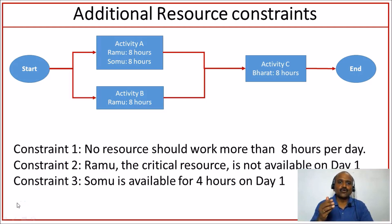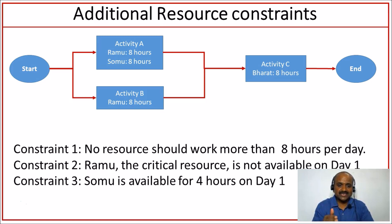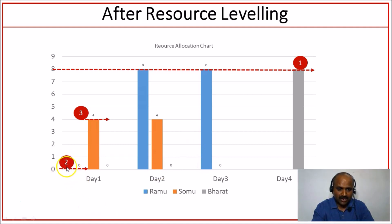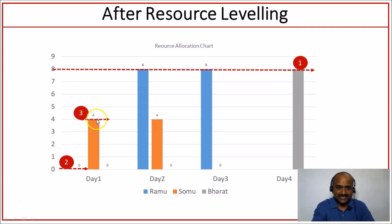What will happen if we have more resource constraints applied to our example? We already know constraint one states that no resource should work more than eight hours. Constraint 2 says Ramu, the critical resource, is not available on day one. Constraint 3 says Somu is available only for four hours on day one. Our resource graph now shows this: the dotted line indicates no resource should work more than eight hours; there is no blue bar for Ramu because he is not available; and the orange bar for Somu shows only four hours.